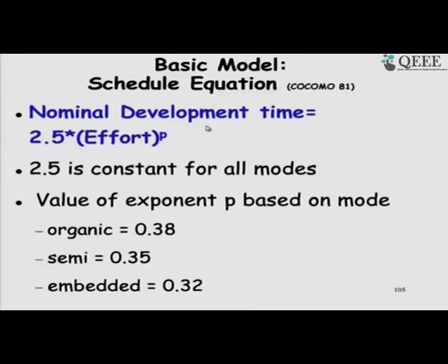But if we employ just one person, it will definitely take more time, or let us say we employ too many persons from the beginning, like 100 persons, and keep that constant, then also the time will be more; we will see that. So, this is the minimal time, basically, when the team size is ideally deployed.